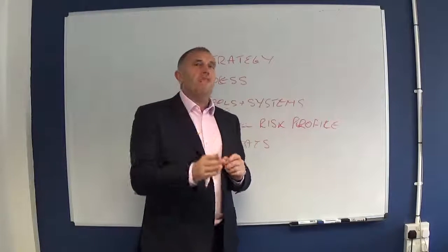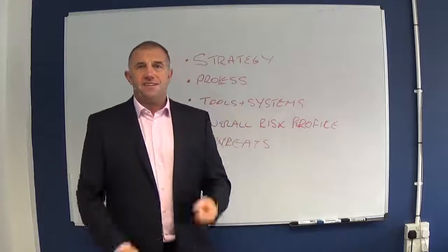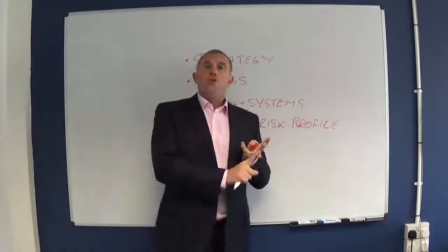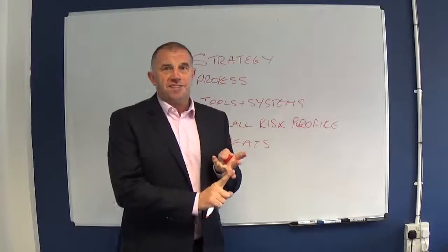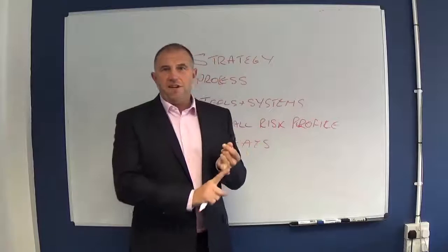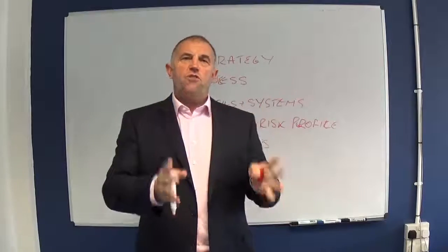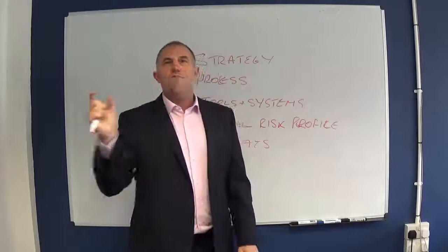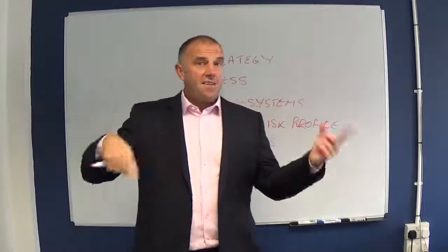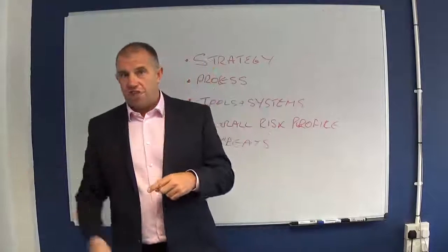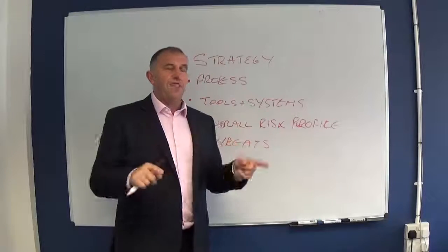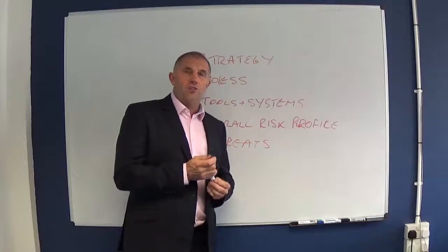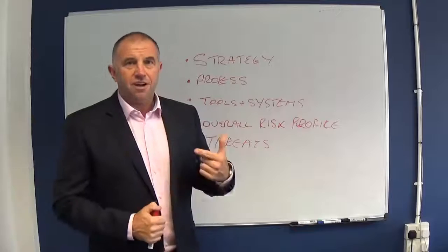So every program suffers from similar threats: budget cuts, changing scope, no blueprint, so you don't really know where you're going and everybody thinks that's too complicated, availability of skills and resources. So those are threats that you know you're going to have. If you say to each of your projects, you manage these threats, they might actually create different risks in each project. But you, at the program level, can at least track them rather than trying to decipher a load of incoherent words in risk registers. I hope that comes in handy.